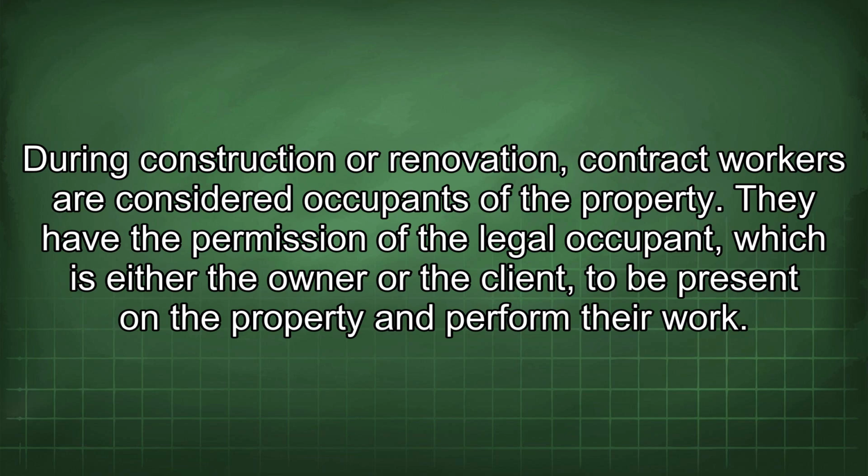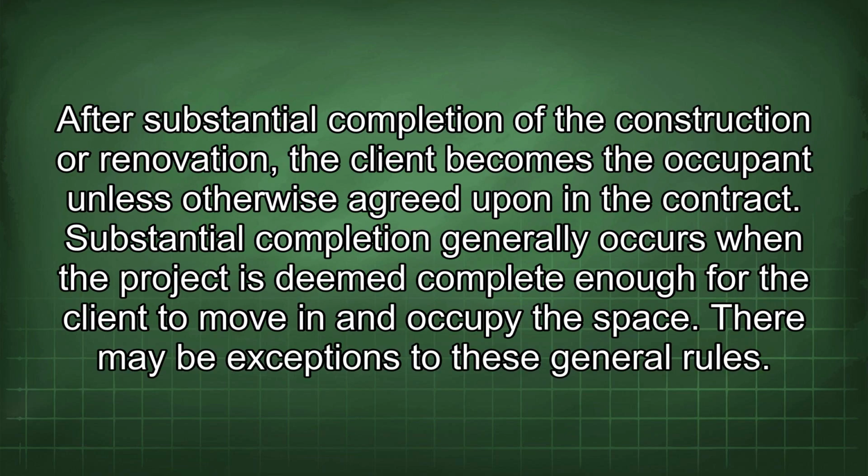They have the permission of the legal occupant, which is either the owner or the client, to be present on the property and perform their work. After substantial completion of the construction or renovation, the client becomes the occupant unless otherwise agreed upon in the contract. Substantial completion generally occurs when the project is deemed complete enough for the client to move in and occupy the space. There may be exceptions to these general rules.